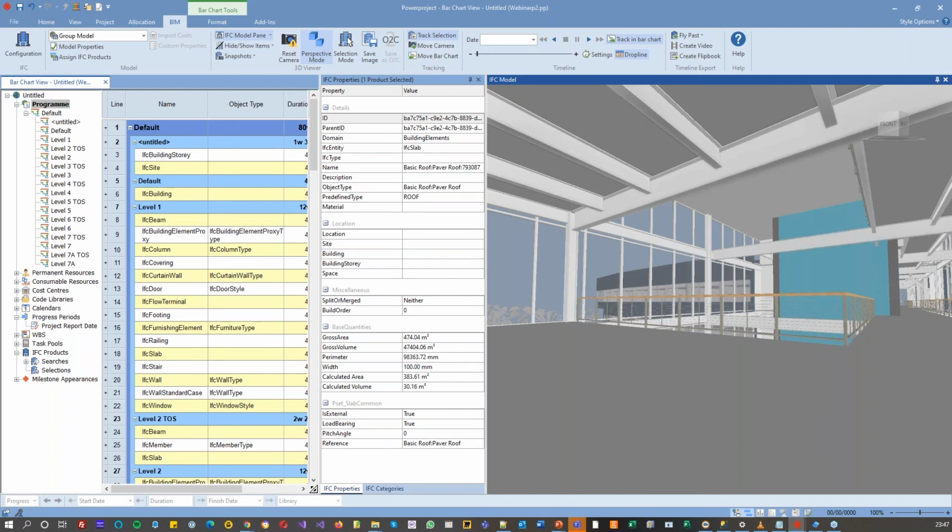Someone's asked, do you have to import the cranes and so forth? Yes, you do. The basic requirement for a site object is that it's a single element IFC. So it's very basic. There are no moving parts to it, no separate parts to it. It's just one model for the whole element, the whole item. You just export it, you choose it once, and you can use it multiple times as different site objects. You only have to import it once.